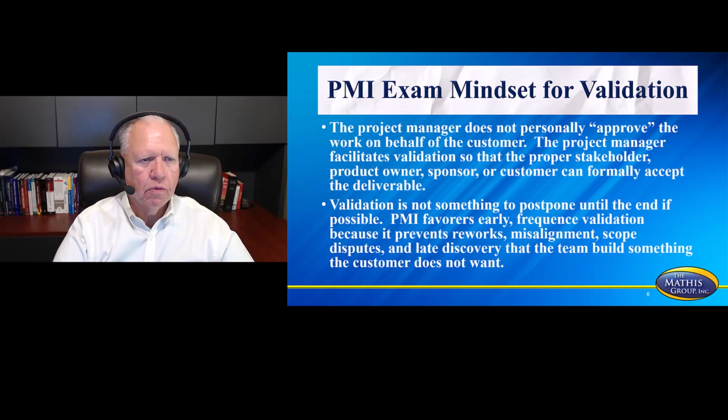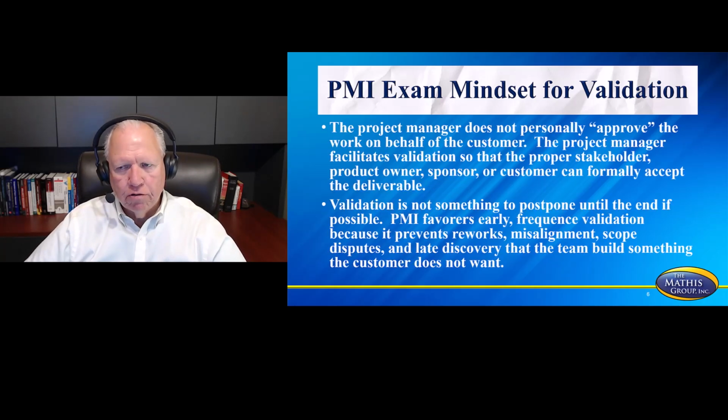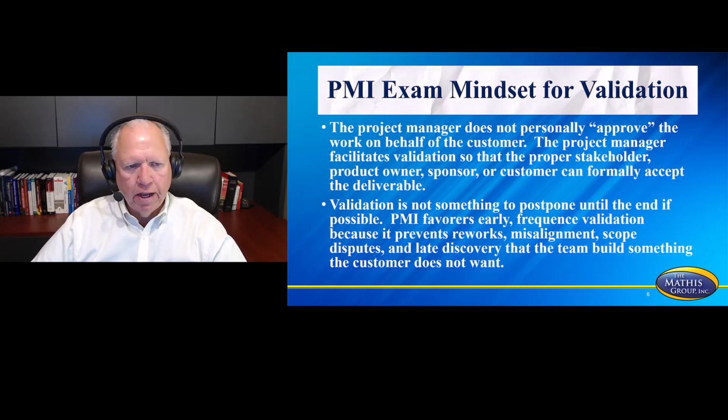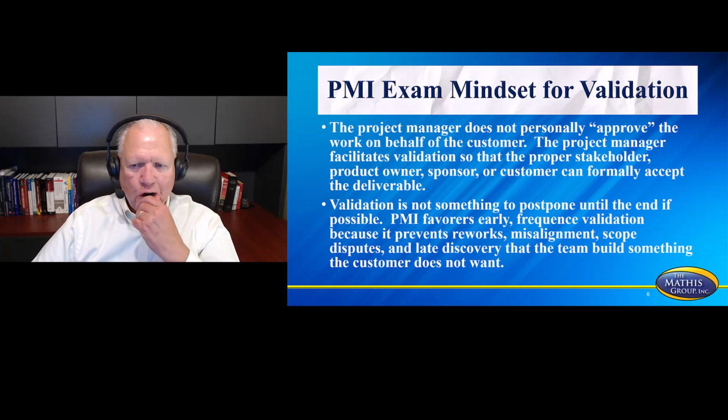The project manager does not personally approve the work on behalf of the customer. The project manager facilitates validation so that the proper stakeholder, product owner, sponsor, or customer can formally accept the deliverable.